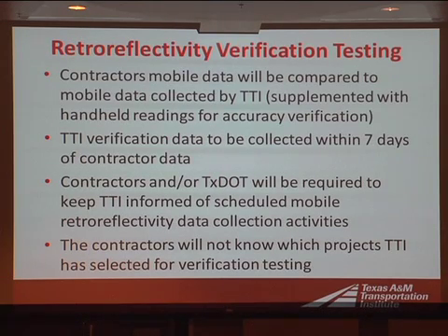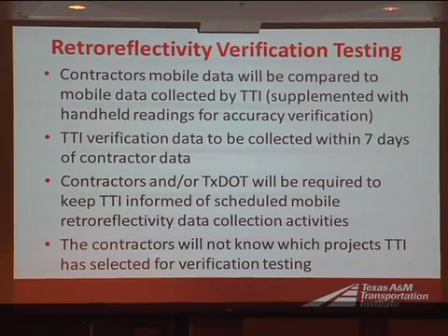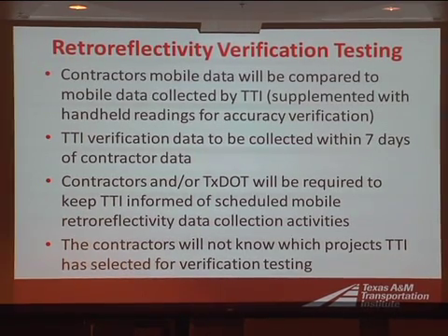The goal is to have this be a blind evaluation. The contractors won't know which jobs we're going to be monitoring. We don't want them to do their best work only on the projects that we're going to be evaluating. So we're looking at having the contractors contact TTI ahead of time when they have these mobile retroreflectivity data collections scheduled, and then we'll be able to schedule the specific projects that we want to evaluate.